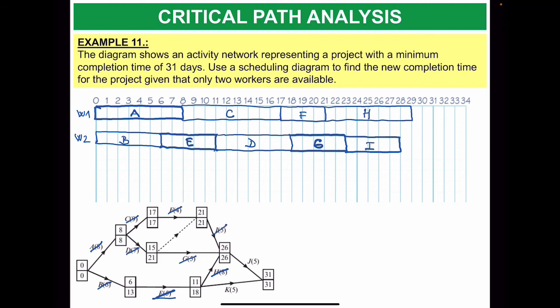This is finished. Now I know J depends on I, H, and G. I, H, and G must be finished. Okay, so all of them must be finished, so J can go here. This is 5 units. 1, 2, 3, 4, 5.